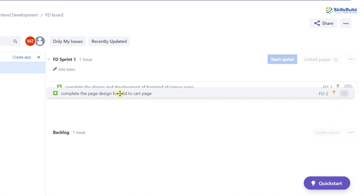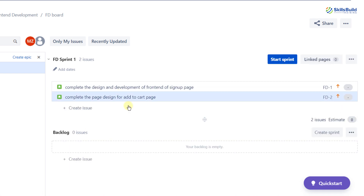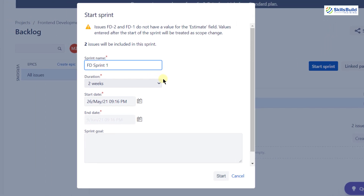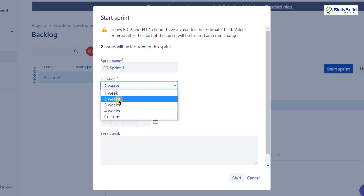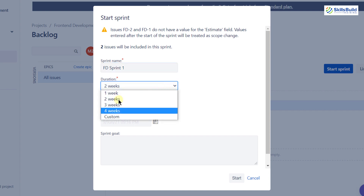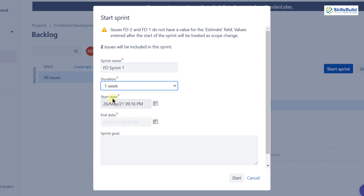I'll drag and drop both stories into the sprint. Now I have two stories in my sprint, and there is a 'Start Sprint' button. Clicking it allows us to set the duration — by default it's two weeks, but you can go with one week, two weeks, three weeks, four weeks, or a custom duration. I'm going with one week. It will automatically take the date, and you can rename your sprint as well. After that, I'll click start.